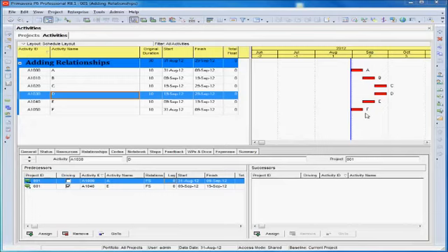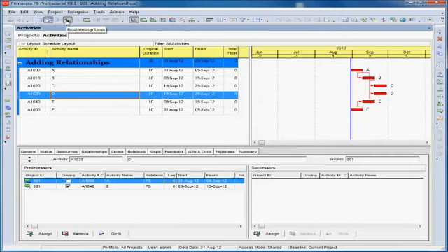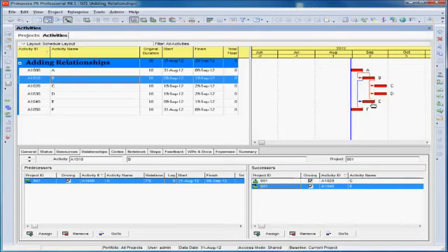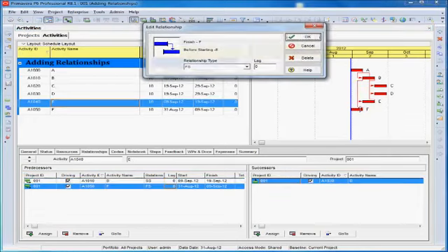The Gantt chart on the right can also be used by clicking on Show Relationship Lines. This will show the sequence of work. When the arrow is black, a new relationship can be added. For example, we can link B to E. When the arrow is vertical, this means that the relationship can be modified. If you double-click, you get a small box. The pull-down menu shows the relationship types that we have. We can also assign a lag here.